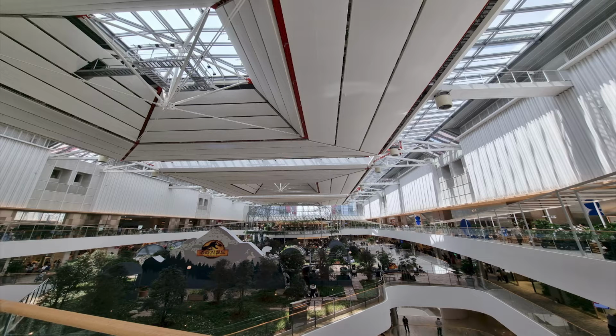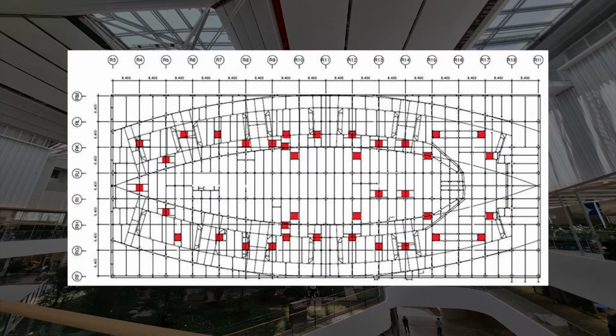In general, roofs are constructed on a hard structure such as columns and beams. However, in the case of the Hyundai Seoul, there were no columns to support it, so a temporary band structure was needed to install the roof structures. When the construction of the building was completed up to the 5th floor, temporary areas for the installation of the bands were built over the 5th and 6th floors.